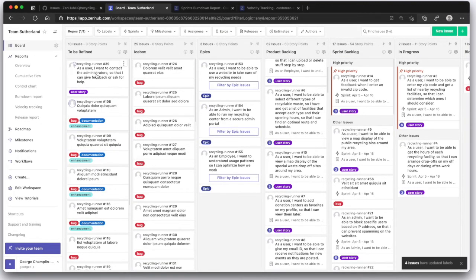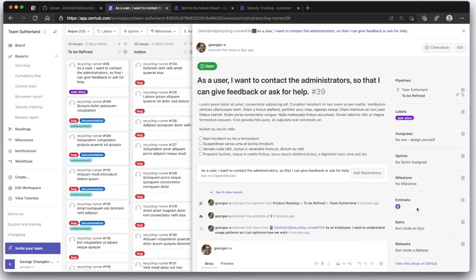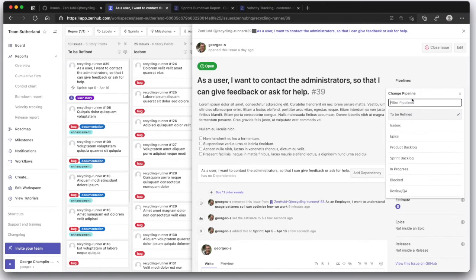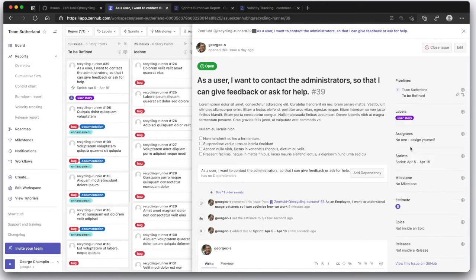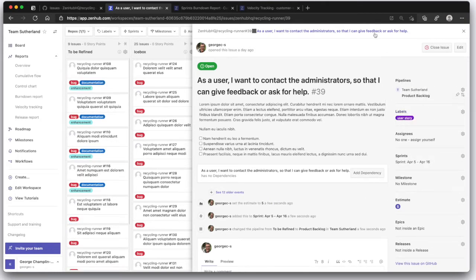A great refinement view. So I click on the issue, we can come together as a team, have a round of planning poker. Say this seems like a medium effort user story, we can assign it to the next sprint, and we can put it in the product backlog, send it right to the top so we make sure it gets in for the next sprint.